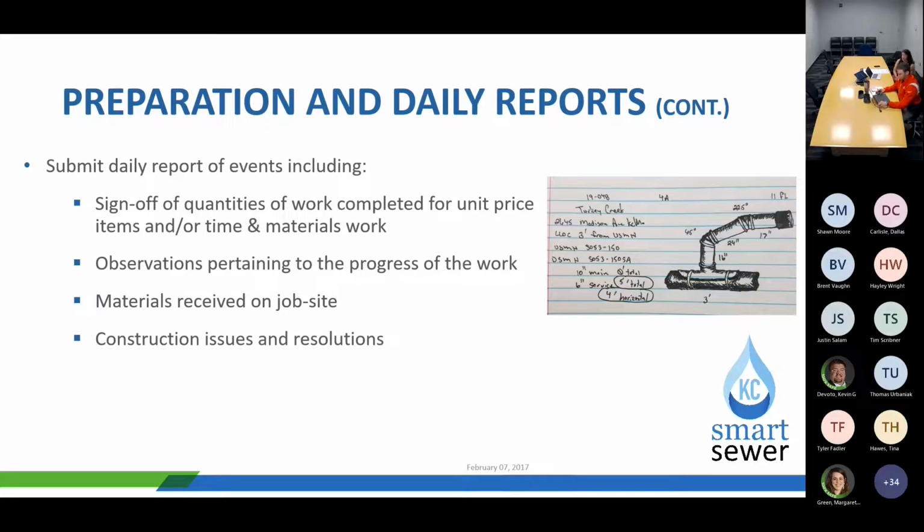So the resolution was, hey, it's marked. Make sure whoever is futuristically working in that area calls 811, which is USIC or One Call, and they get those utility locates out there.